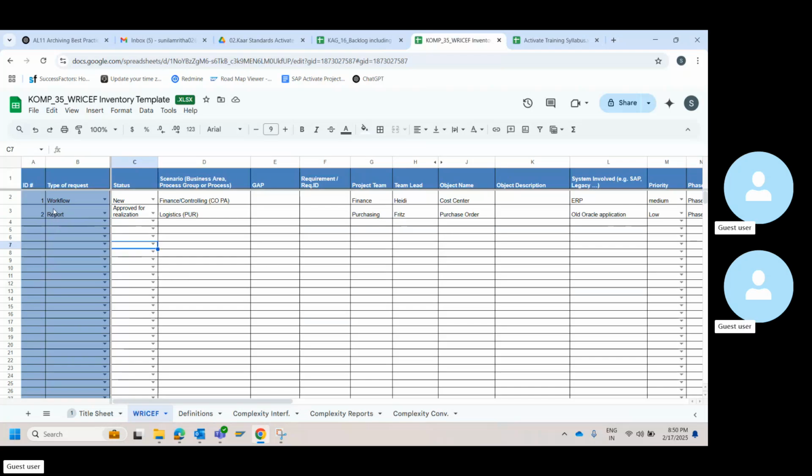So you might have 100 in the backlog during the explore phase. As you go towards realize, you do a UAT solution walkthrough. This 100 might go up to 150, 120. And then you might fix a few things. Then again, when you go to UAT, you're talking to too many key users, that might go up to 250.